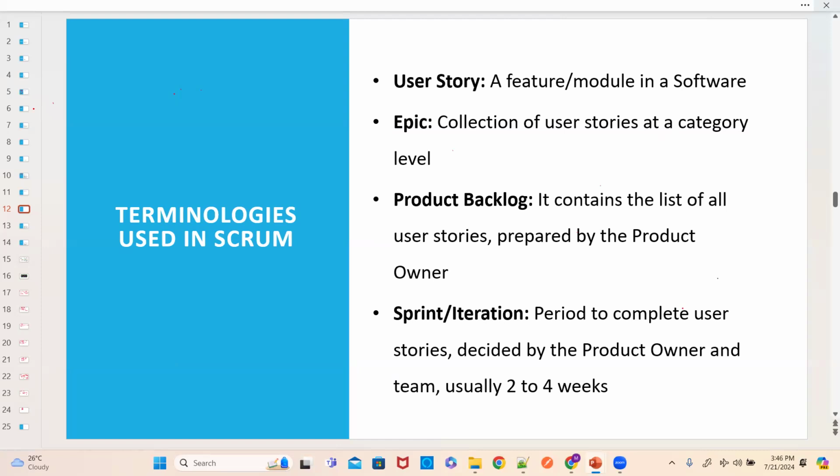Now this system API design, development, and deployment will be created as a user story, and it will be assigned to me. What does it mean? Now I am responsible for designing that particular system API, implementing it, testing it, meaning unit testing, whichever is applicable to a developer, and then deploying it to the development and QA environments. That entire task can be called a user story.